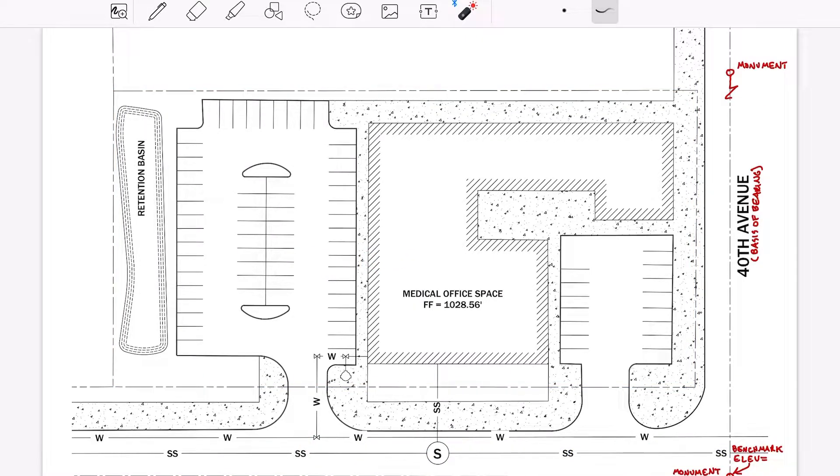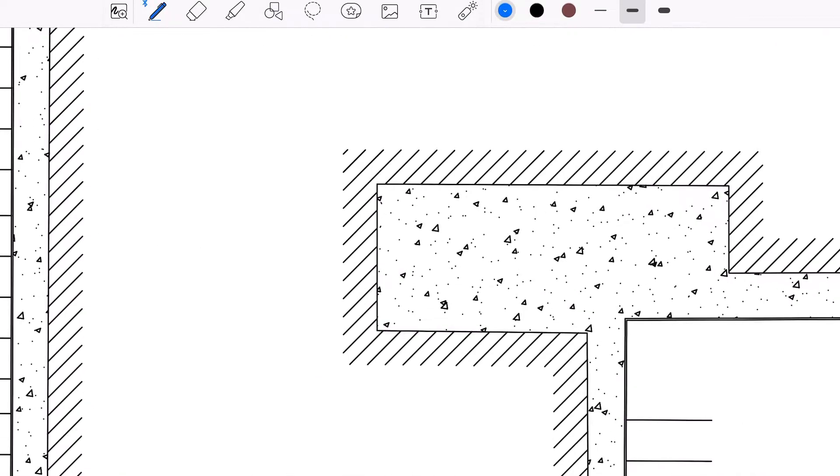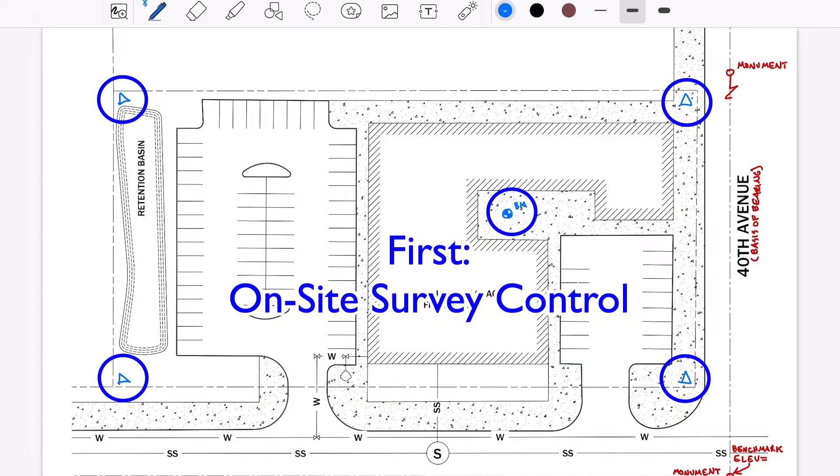Once that previous work has been verified, the surveyor typically sets additional monumentation around the project site, such as control points or benchmarks that can be utilized for location and construction through the life of the project.